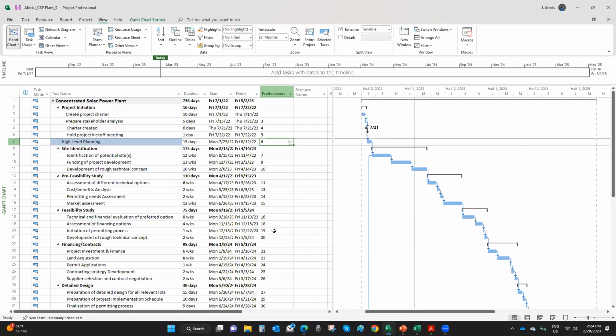Remember, one is to assign more resources, the idea of effort driven. If I assign more resources to a project activity after an initial resource assignment, then the software will assume that I'm trying to reduce the duration of the project deliverable or the project activities.